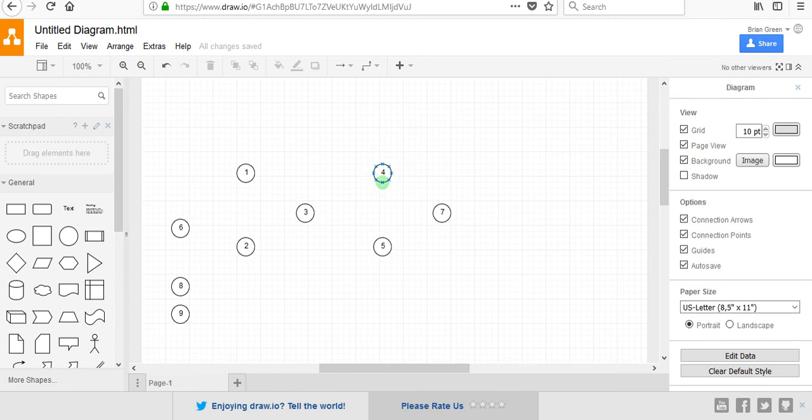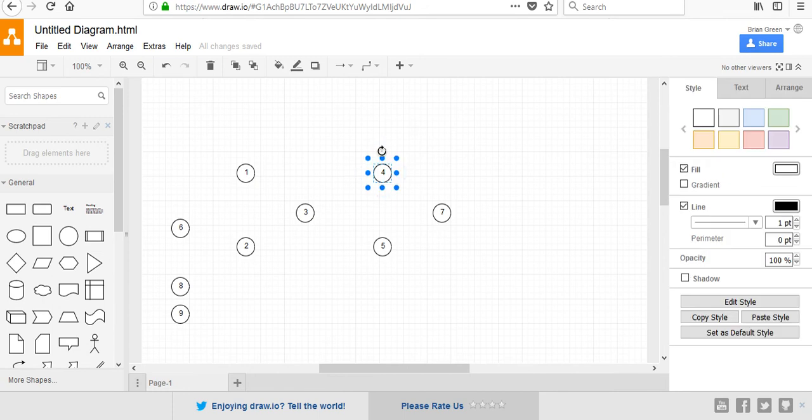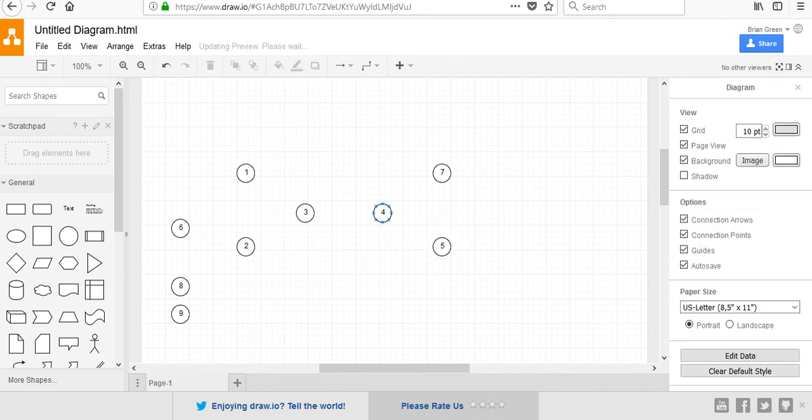In fact, if I think about this, maybe because I've got some slack time on number 5, I'm going to go ahead and place my order first. Oops, I didn't mean to blow that up. Then this guy can start happening after I receive them, and this guy can also start happening after. That way I'm not removing these PCs before I actually have the other ones in hand, right? What if I have to start classes before they actually get here?